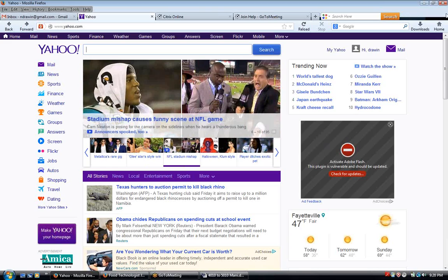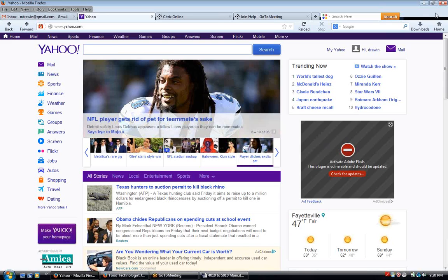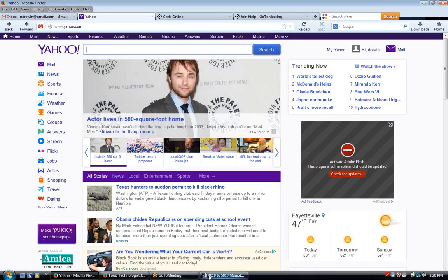So let's say you have 5 rules listed down. If you implement those 5 rules, then it is going to achieve 2 requirements. So you need to link each rule to business requirement 1, 2, 3, 4, or just one. That kind of a linkage is required. For every rule, you need to link the requirement: that rule is linked with which business requirement bullet point. Right. Okay. So yeah, Surya, it's an action which triggers. That's right. You got it right.